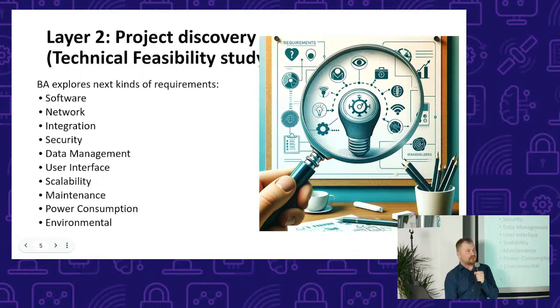During the discovery phase, we also can figure out, for example, the probable cost of the future solution or device, what price we could offer to our possible clients, and even understand whether we need to develop this product or have to stop the development on this phase, so as not to spend money and time on a useless device, or a useless solution.